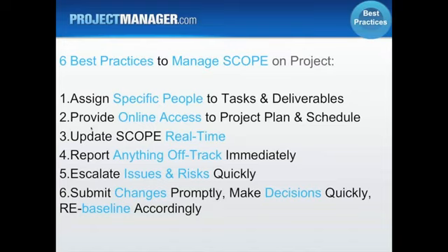And then it's important to not only your team, like you as a project manager, your team, your change control board, your customers, submitting changes promptly, making decisions quickly, and rebaselining accordingly. Rebaselining is one of the huge things for your scope. Once your change control board does evaluate and approve something, or if they're including new scope or things change, that's your opportunity as the project manager to rebaseline your plans.